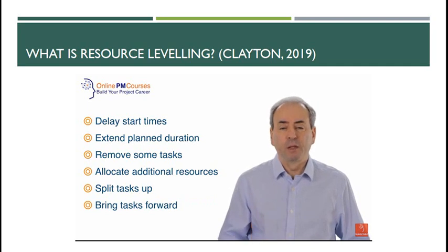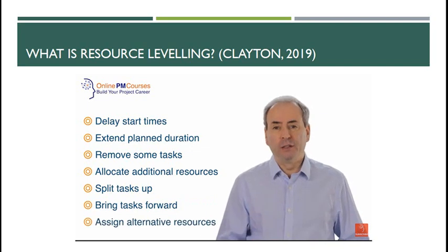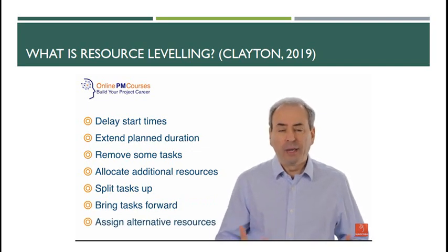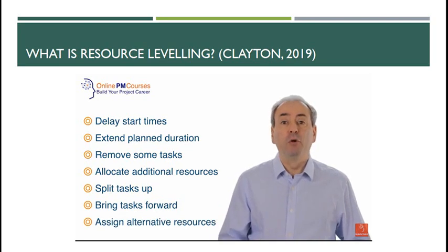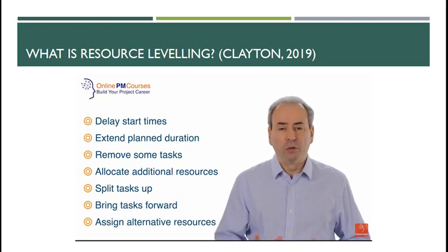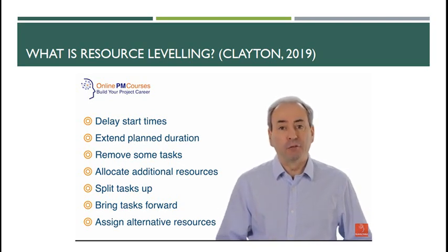And finally, rather than assigning additional resources, we could assign alternative resources where we have the potential to use more skilled, more expert, and therefore more effective people onto the task. Of course, in a project, it's always useful to have new people doing new tasks, learning new skills. But when you're over-allocating those because they have too much learning time, bringing in more experienced, more expert resources can be a solution.